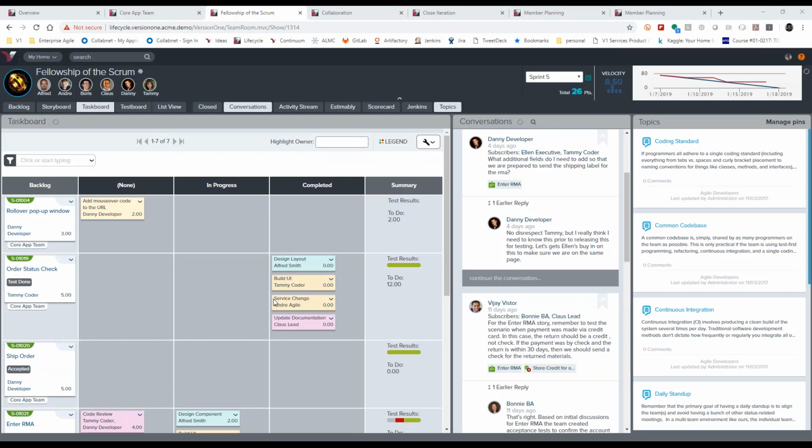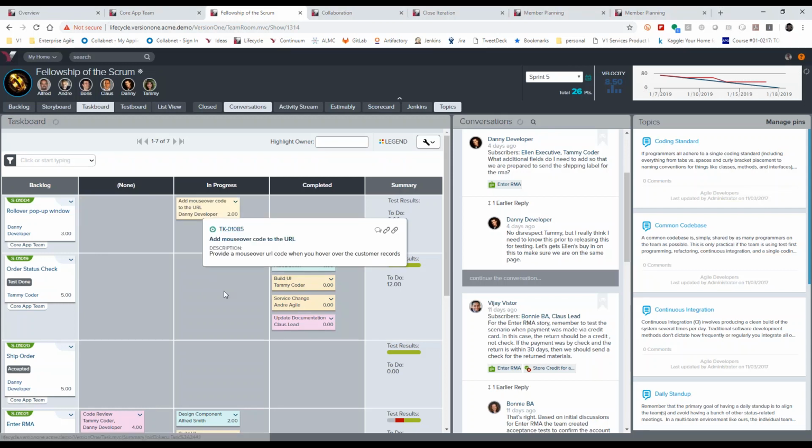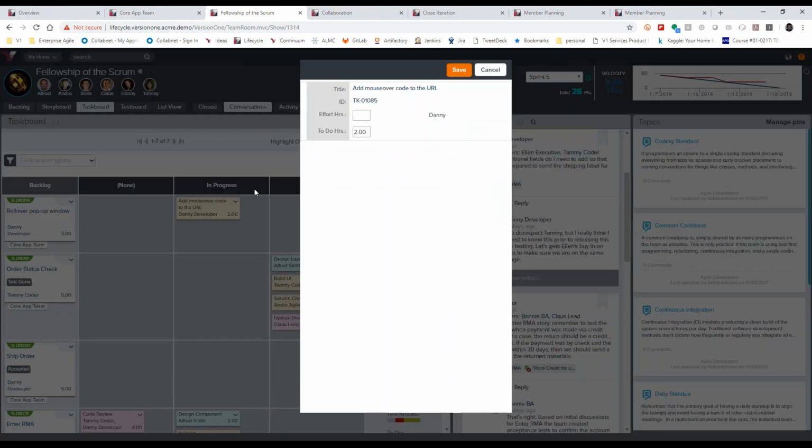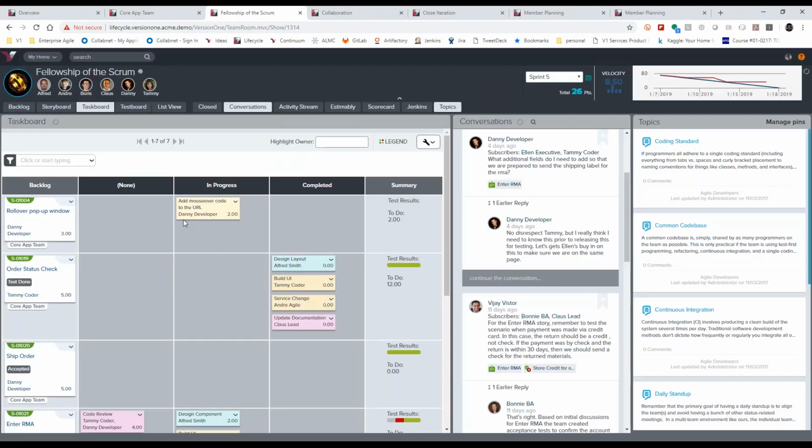So Danny says, all right, I've completed something on this story. I'm going to pick up something new in this other story. I'm making these updates. As I complete things, I can also track my time if that is something we need to do. So I can say, okay, I've spent 3 hours on it yesterday and there's nothing left to do, or I spent 2 hours on it yesterday and I found out there's another half day's worth of work. I can make these updates during all of these things as we are facilitating the daily stand-up, and these will help to drive a lot of the reports.